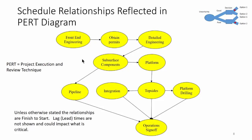We also need to understand the schedule relationships as reflected in this diagram. Front-end engineering has to happen before we can get permits. In the case of operation sign-off, we have to complete the pipeline, the integration, the top sides, and the platform drilling — we can't get signed off until we're ready to go. That means all four of those things have to be completed before we can do the operation sign-off. There may be multiple requirements to be completed before the next task can start.